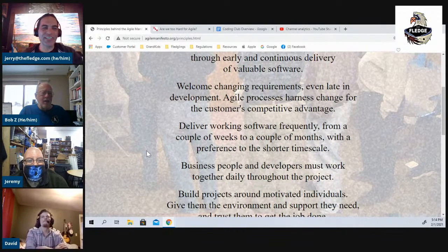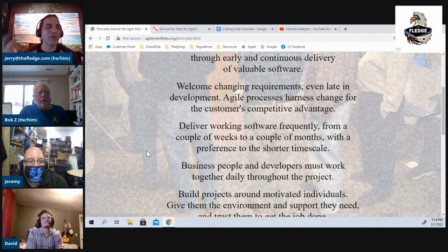As soon as you change one date on a Gantt chart and it cascades or waterfalls through and changes all those other dates, then you're compressing testing. You're throwing out the support document. You're just starting to throw out the controls that you have in place for quality. And again, the customer and the end user are getting screwed in the entire process.